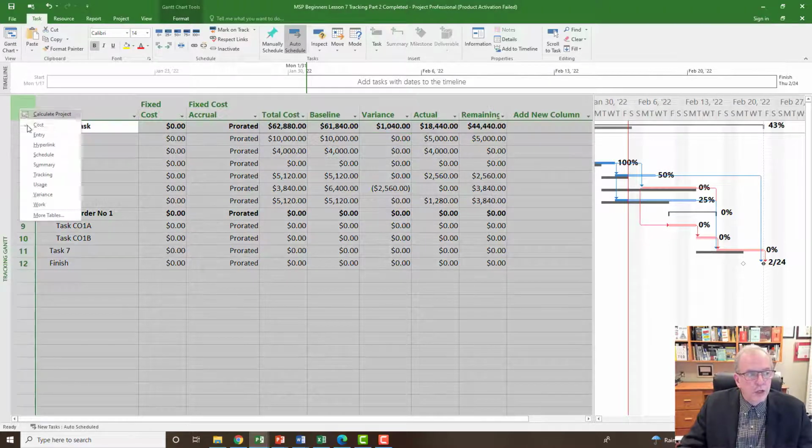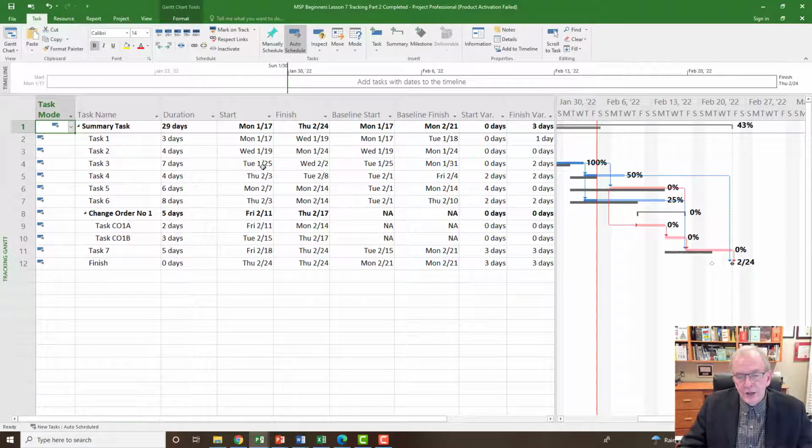Whenever you have a project, you have to think that there are variable costs involved in the project, and there are fixed costs. And sometimes the fixed costs don't change. Sometimes they do. Depends on what it is. Maybe you've delayed a contractor and now they're making a claim that you've delayed them. That might, even though it's a fixed cost, that might end up getting changed.